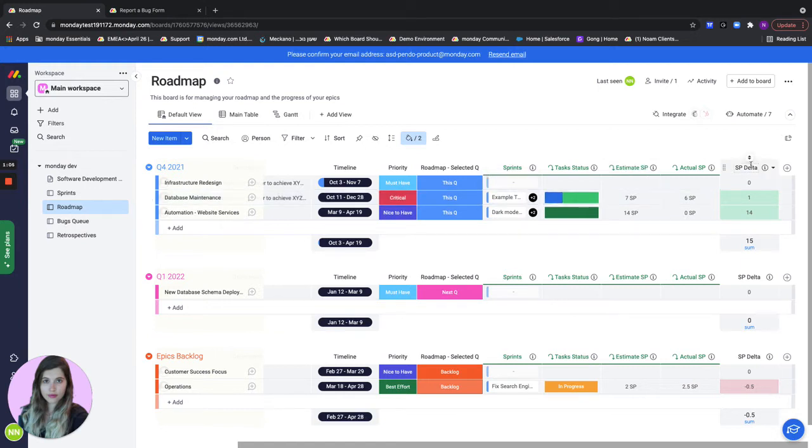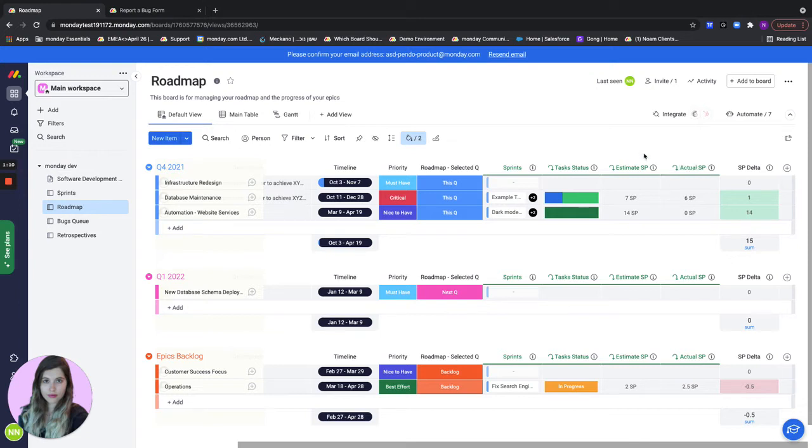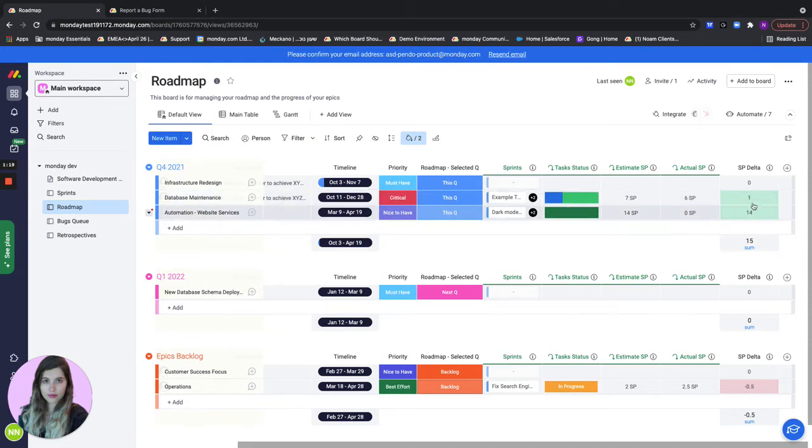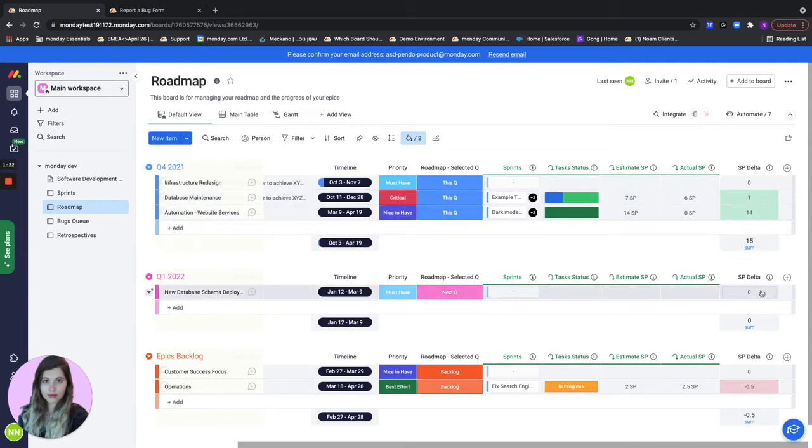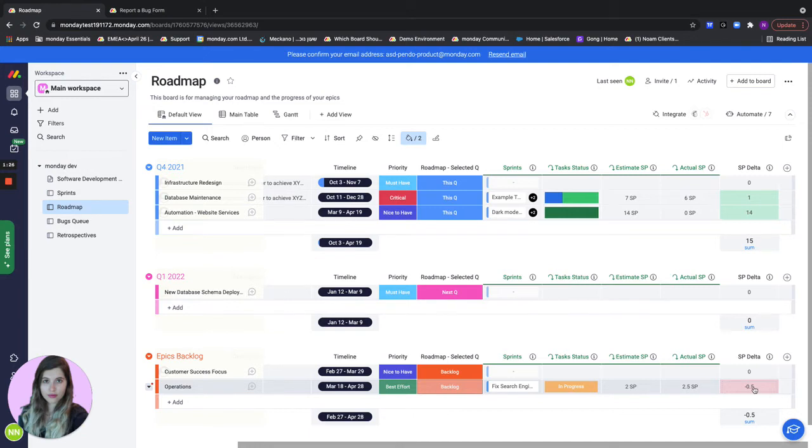We have a very important field which is the delta between the actual story points versus the estimation. This way we can see whether we're going to finish things on time and whether we're on track or not. When the number is above zero it shows as green meaning I'm good, but right here we can see that it's below zero and it shows as red and that means trouble.